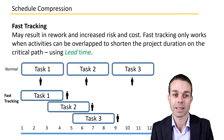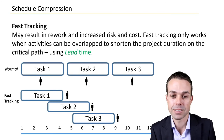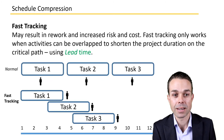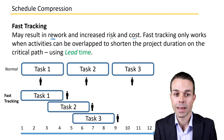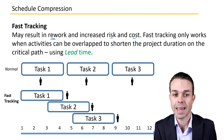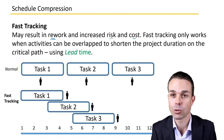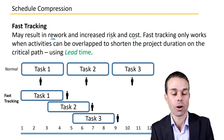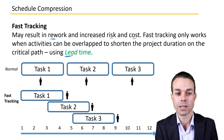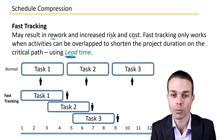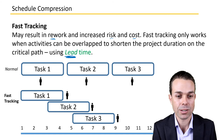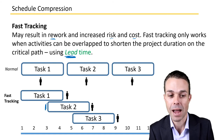The other technique is fast tracking, where we're performing tasks in parallel. This might result in rework and increased risk and cost as well. It only works when activities can be overlapped to happen at the same time to shorten the project duration on the critical path. We're using any available lead time to perform those tasks in parallel.